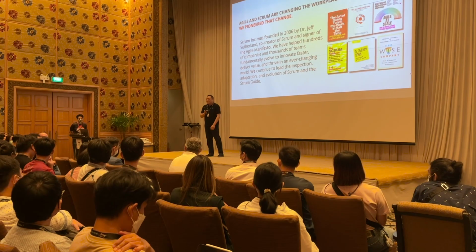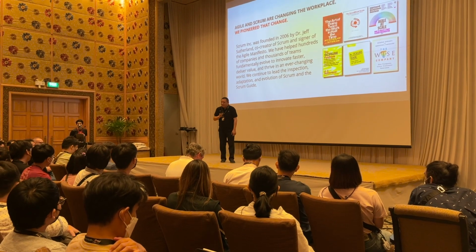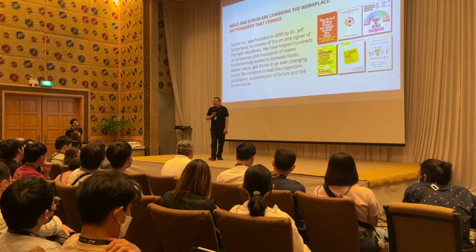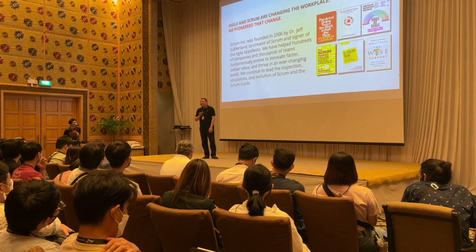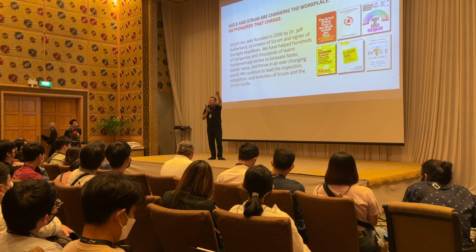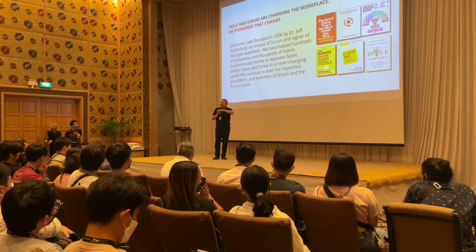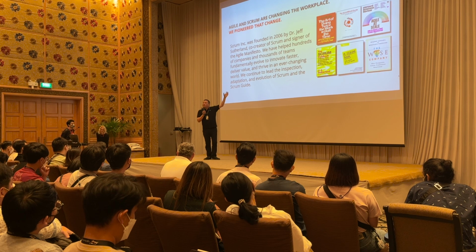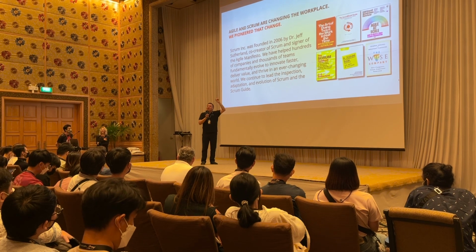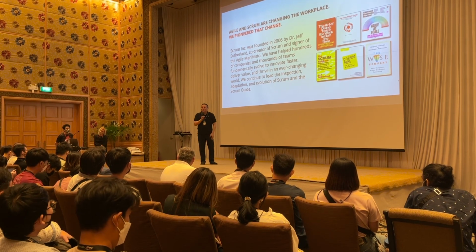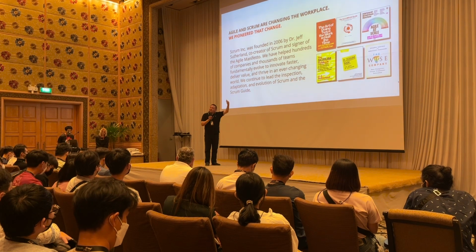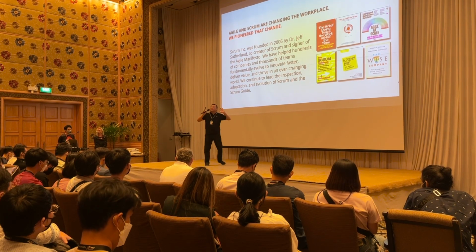Any other question? Besides the structure to create the culture, could you give an example of a good structure and an example of a bad structure? Let me give you an example of bad structure, and then you probably can infer some of the not so bad structure, right? The absolute worst structure would be, I have a UI team, a front-end team, a back-end team, a testing team, a database team. When you receive a requirement, maybe in the form of user story, you need to hand off from the UI team, and then after they are done, you hand it off to the second team, the third team, the fourth team, and the fifth team. You generate so much handoff that your speed is slow, right? And because you're generating so much handoff, once some problem, some bugs occur, nobody says, hey, it's not my bug.